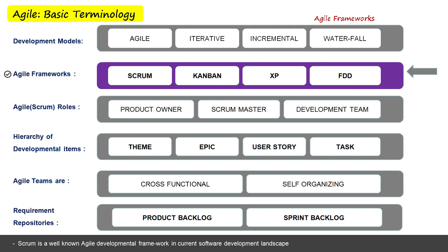Here the project work items could be in one of the stages like ready to work, in progress, and finally done. The work items are in ready to work state or status at the beginning. Once the team pulls the high priority items to work, they are moved to in progress state and known as done once the task is completed successfully. All those successful items are moved out and the reworks are passed through the same cycle. It is an easy and transparent way to resolve service requests when resolving small work items, etc.